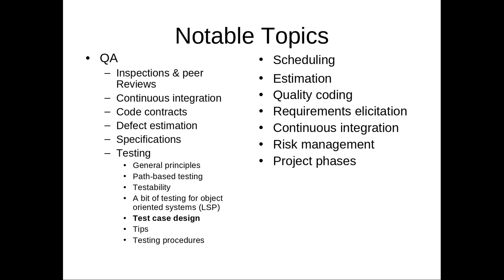Like you can't start testing until the code is submitted, right, Emily? This lends dependencies between tasks, and it's not merely a matter of just adding up the time always, because you have dependencies which can lead to one thing not being able to be started until the first one finishes, or in some cases, there's no dependency and they can run concurrently. They can run together. They can run at the same time.